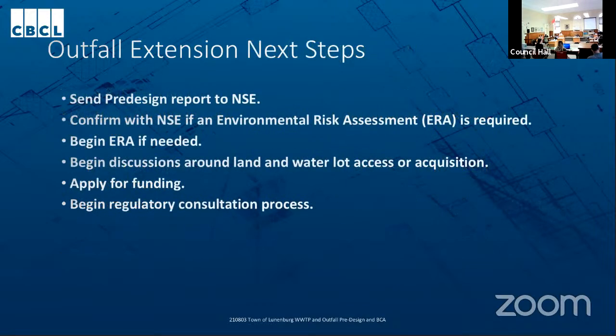Okay. The next steps that we recommend are to send the pre-design report to Nova Scotia Environment and to confirm with them if an environmental risk assessment for the receiving water is required, because this takes some time to complete. And then, if required, to begin that ERA. Also, to begin discussions around land and water lot access or acquisition, to apply for funding, and to begin the regulatory consultation process.